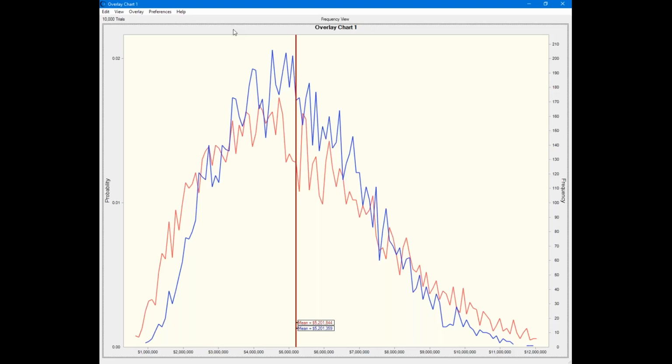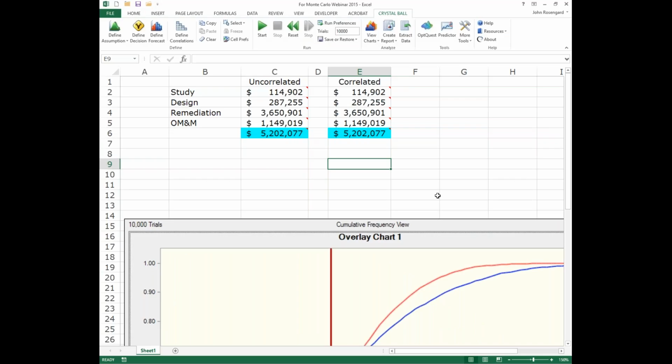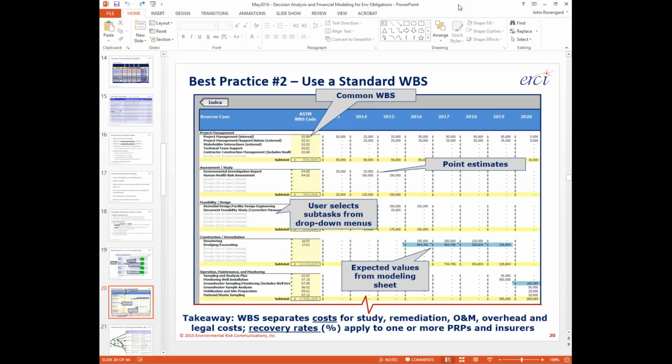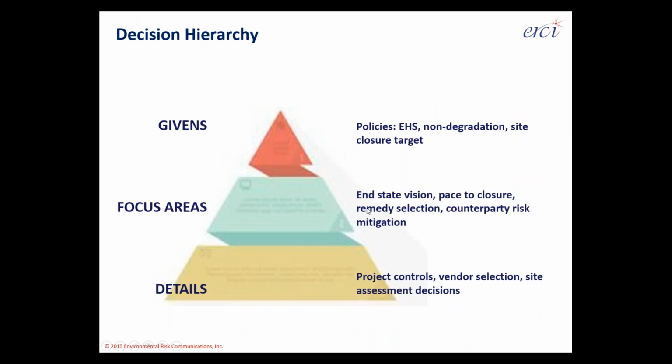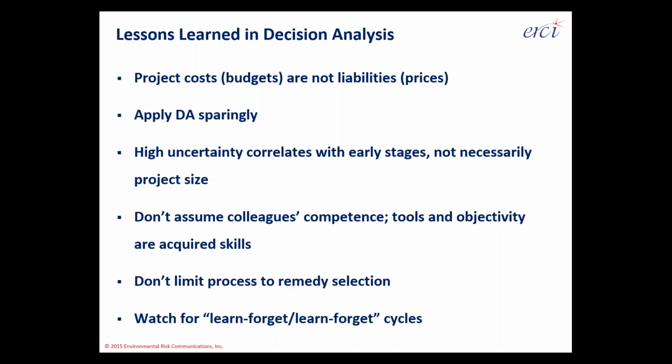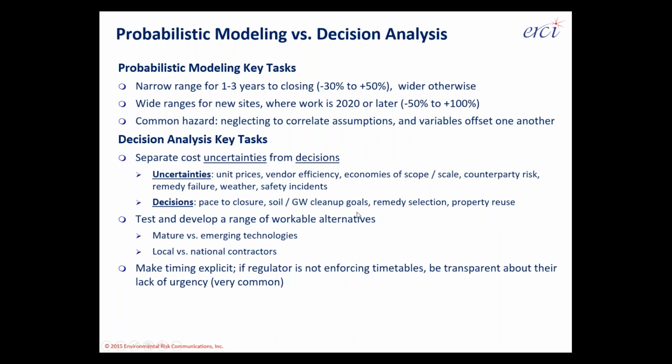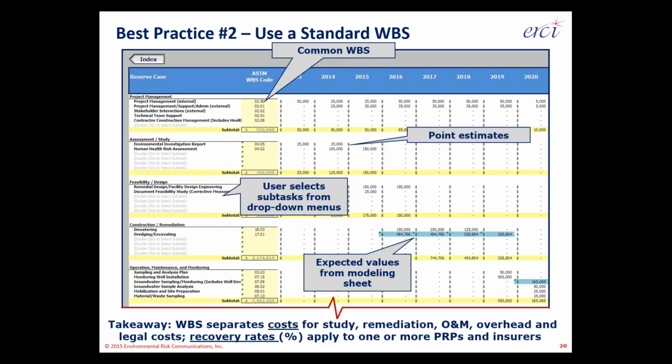And that's, again, part of what correlations do. If you leave the step out of doing correlations, you can artificially narrow your range just by leaving variables out. Now here I've just got 5 variables. Imagine you've got a site that you're trying to model that's got 10 variables or more. That process of doing the correlations well can be quite a bit different, and you can find that, again, with more variables, the need for correlation goes up astronomically. So again, as I fast forward through the content we've been through so far, I just want to point out the value in doing this well is not just in having the tool, but also in having the discipline to do the work in a way that can be reproduced later on.